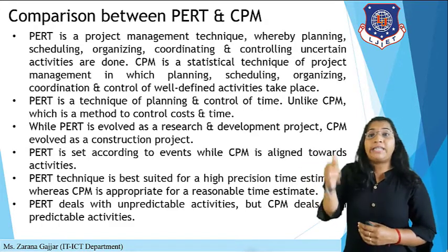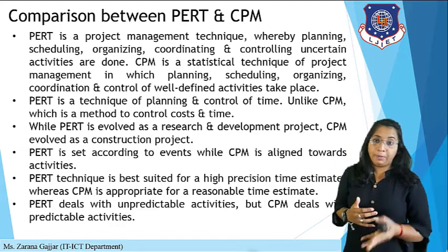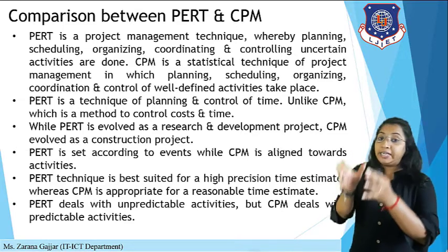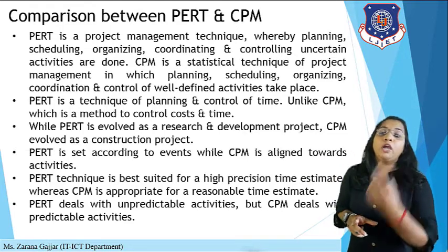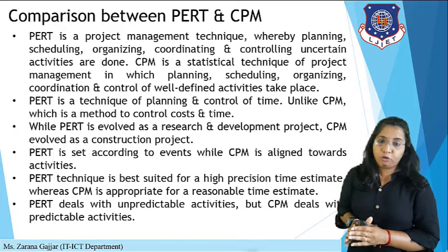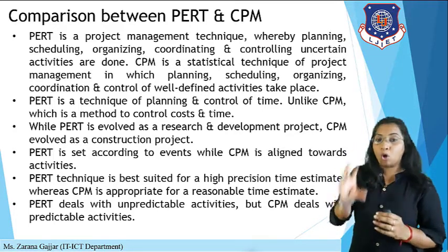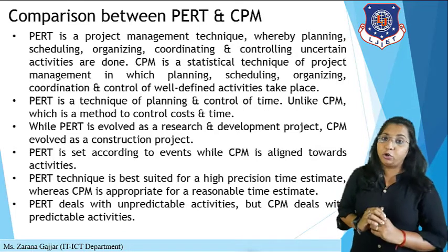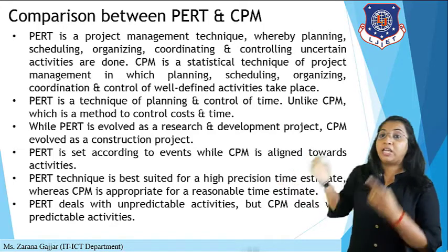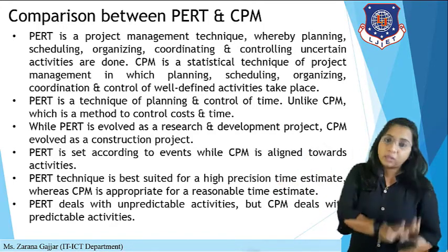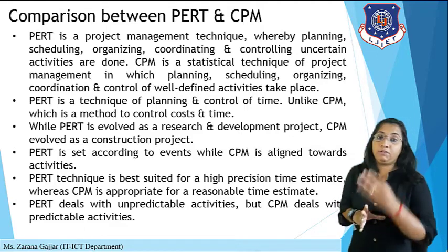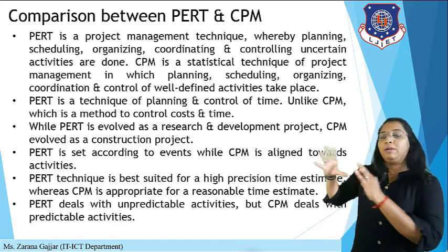Then PERT is a technique of planning and control of time. Okay, so you are planning for any activity and you are controlling that activity. But unlike PERT, CPM is a method to control cost and time. Okay, so instead of only planning and control of time, CPM will focus on cost control also and time control also. Okay, then while PERT is involved in research and development projects, CPM is involved in construction projects. Okay, so if your project is related to some research activity or development of a project, that will be handled by PERT.